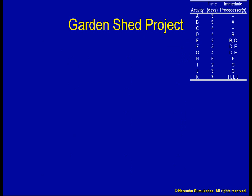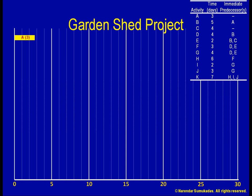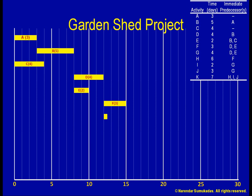Let me now try to put these activities on a timeline. Activity A does not have any predecessors, so it can start right away — it takes 3 days. Activity B can start once A is completed and takes 5 days. Like A, C can also start right away. D has to wait until B is completed. E has to wait for both B and C to be completed, which essentially means until B is completed. F has to wait for both D and E. G also has to wait for both D and E. H has to wait for F. I and J have to wait for G. Finally, K has to wait for H, I, and J.